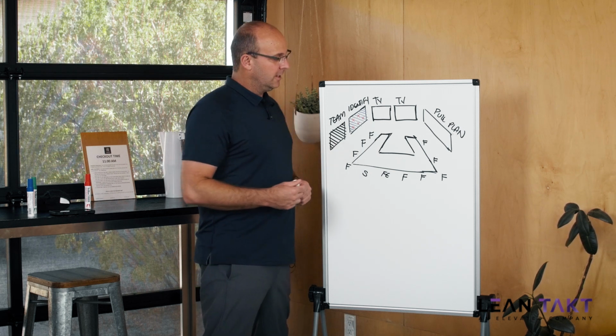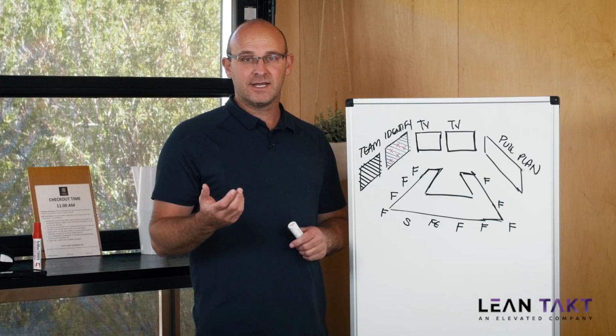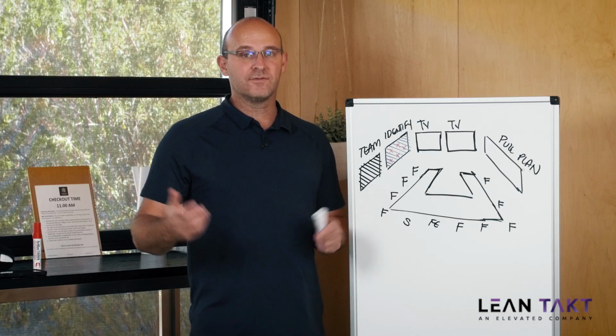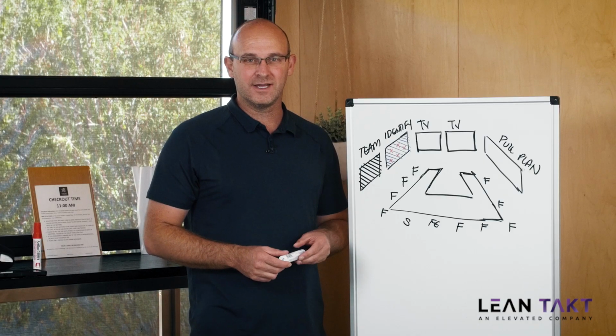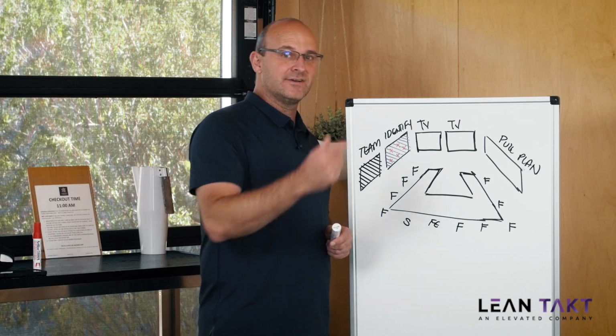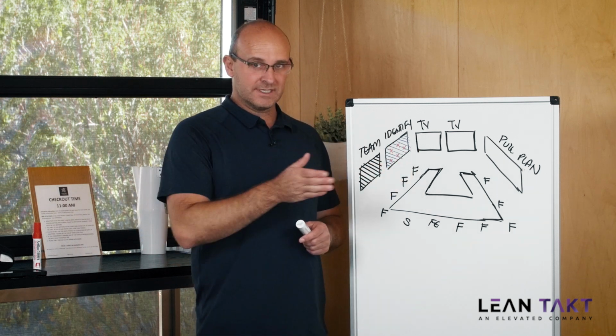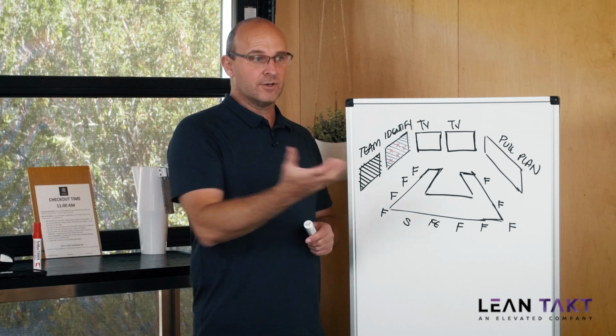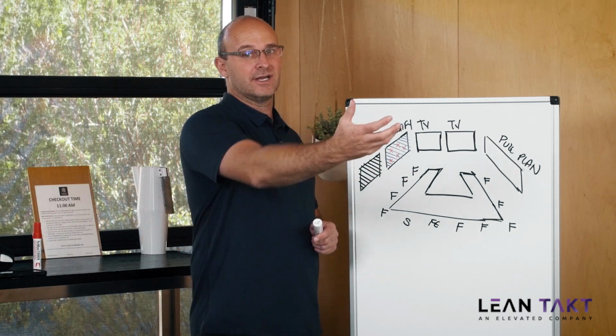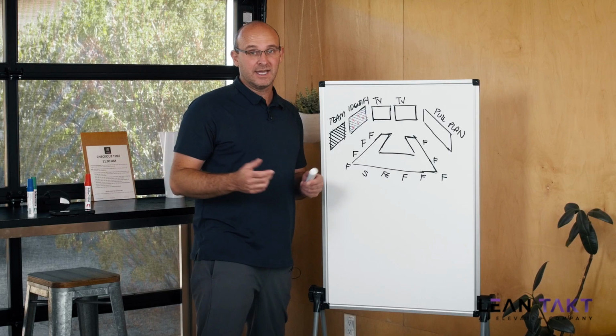They're permanent things. Roadblocks are things out ahead that can be removed, solved, fixed, that get out of your way. That's why it's called takt steering and control, because we want to steer the train of trades and we want to control the environment and clear everything out of the way ahead of the train.